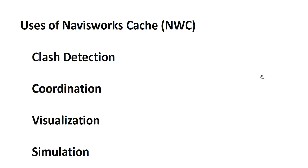Clash detection is one of the primary uses of NWC files. Navisworks can detect clashes between different building elements, such as structural beams conflicting with ductwork, or piping systems intersecting with walls. Clash detection helps identify potential conflicts early in the design or construction process, allowing teams to resolve issues before they become costly problems on site.